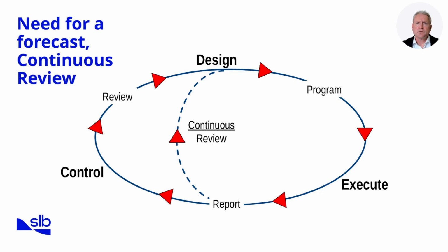Forecasting in drilling is not a one-time task. It is a continuous process that guides us through the entire well delivery cycle. We begin by designing the forecast, which establishes expected performance, risk awareness, and operational parameters. From there, the program undergoes review to ensure assumptions remain valid before execution. As the well is drilled, control and monitoring are applied in real time. This ensures that the execution phase is guided by accurate and up-to-date information, not just the initial design.